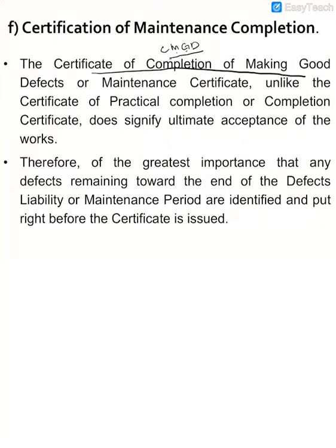Once they issue CMGD, the project is fully accepted, and then the project will be handed over to the maintenance authority.